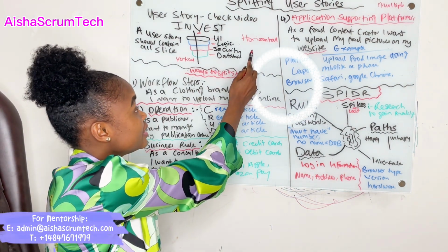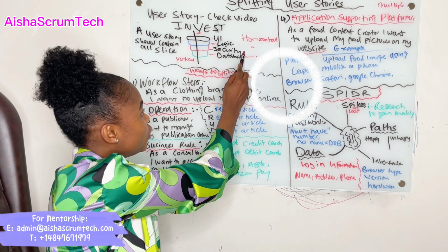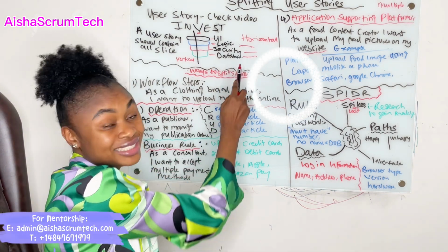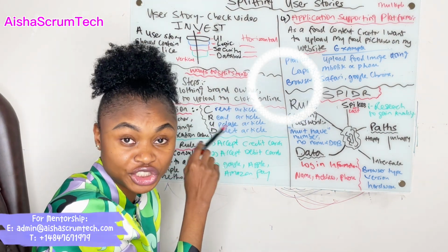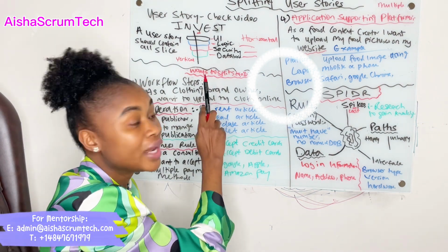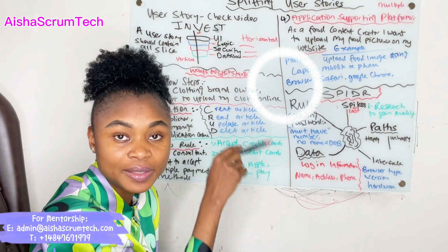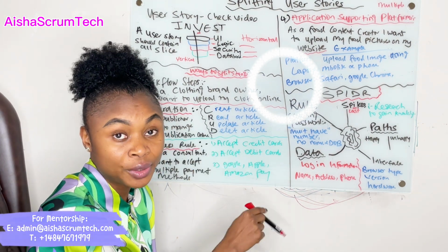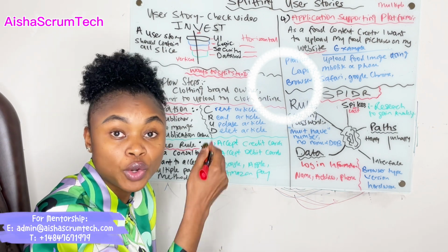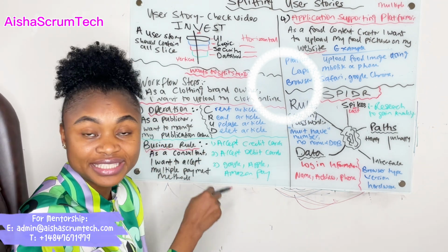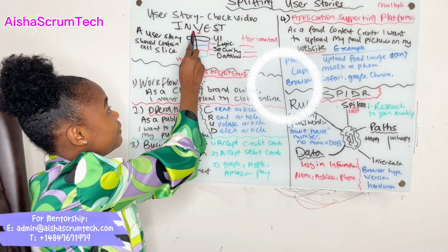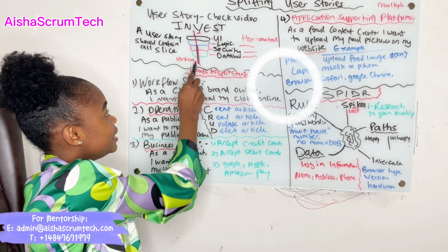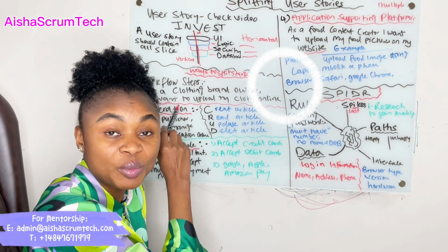That's the horizontal method, just one layer each, which is very common in the traditional method, whereby one layer must be completed before moving on to the next. But in Agile, we encourage and coach our team to write a user story that's vertically sliced, so they're building some part of each layer.